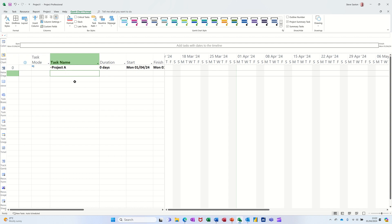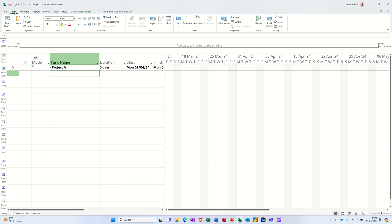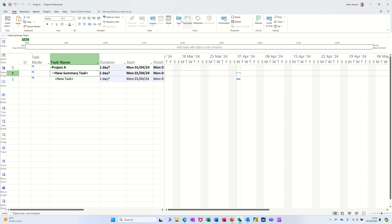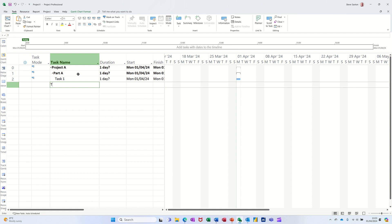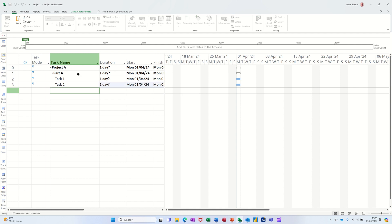Another way you could do it is you could go back to the task tab. This is a different summary task. It says summary there but it is not the project summary. If I click on that it creates a summary task, so I'm going to call that Part A, and then underneath that you get subtasks. So I'll go task one, task two, etc. and they all fall underneath.